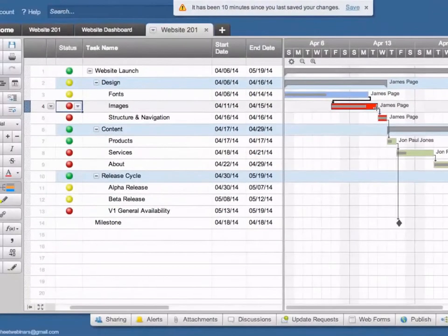Next, we're going to talk about cell linking. And cell linking is extremely useful when you're consolidating information from multiple sheets into one summary or master sheet. So let's say you have different projects, and each sheet has different users assigned to the tasks, and you would like to see a quick summary of these sheets with live data. So we have two website launch sheets, and we need to create a master sheet to get a general overview of how the project is coming along and to share it with our higher-ups, who don't necessarily need to see the details of each sheet.